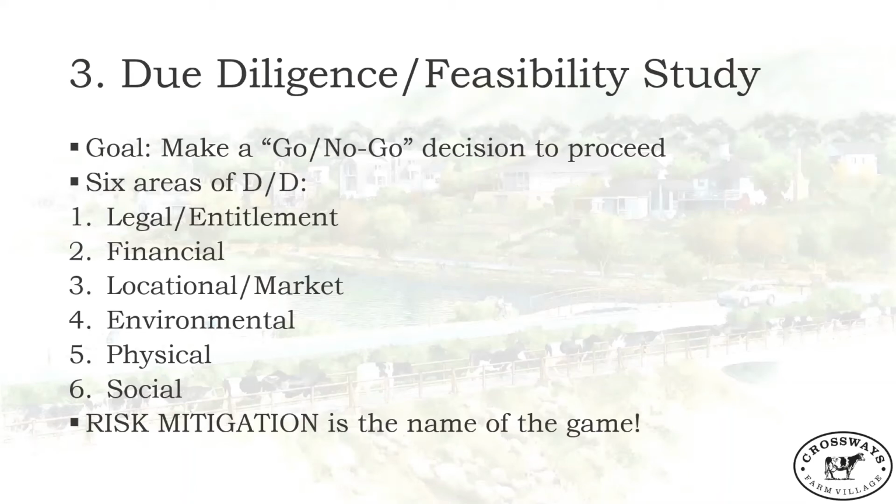Environmental due diligence involves analyzing the site for existing environmental issues that need to be mitigated, or maybe you do need to drop the project because of them. These get very tricky. What you don't want to do is take control of a site that has a serious environmental issue, because it will bankrupt you before you ever start turning dirt. And the way that we do that is a Phase 1 Environmental Site Assessment. We just basically go walk the site. You have an environmental engineer typically that will walk the site and try and identify any issues out there.